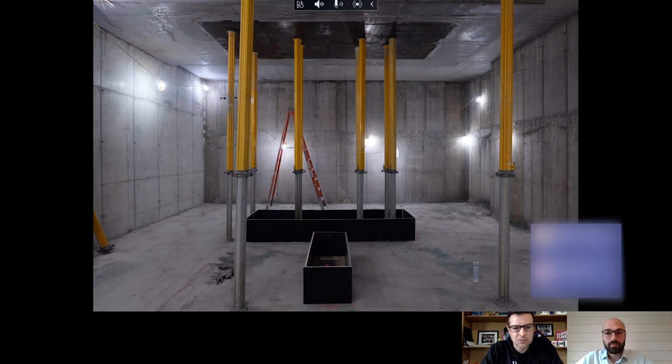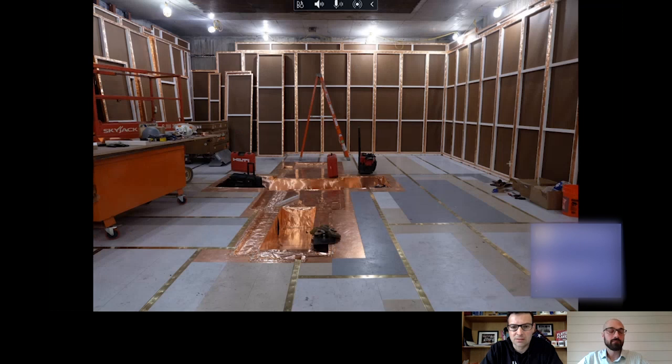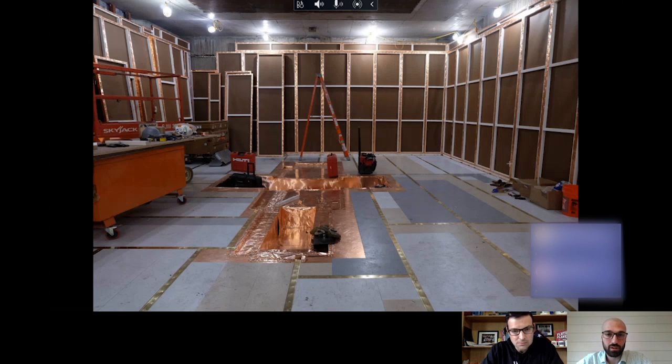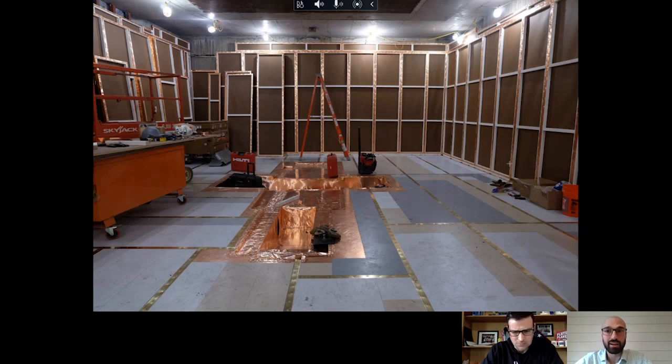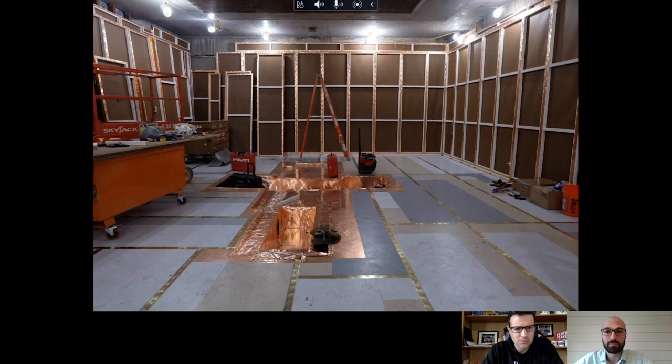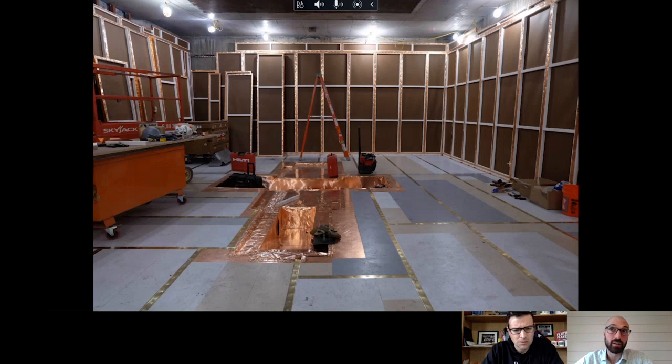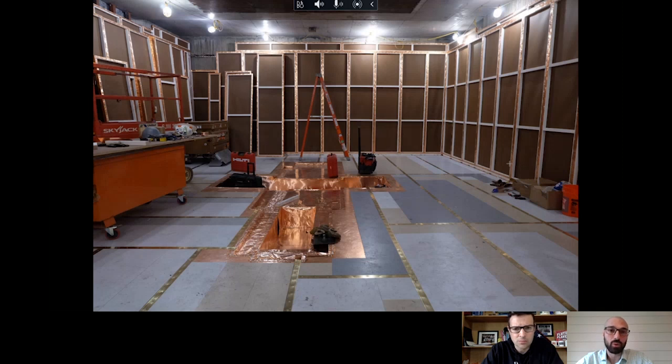Are these photos you could share? Absolutely. All right. Oh, wow. Look at all the copper. So this was another challenge too, just because you don't typically not have access to every side of your RF shield. So this was a little trickier than usual, but we worked through the details there. So the sequencing of the panel install and the penetrations of the quench vent duct work, those were important to coordinate.